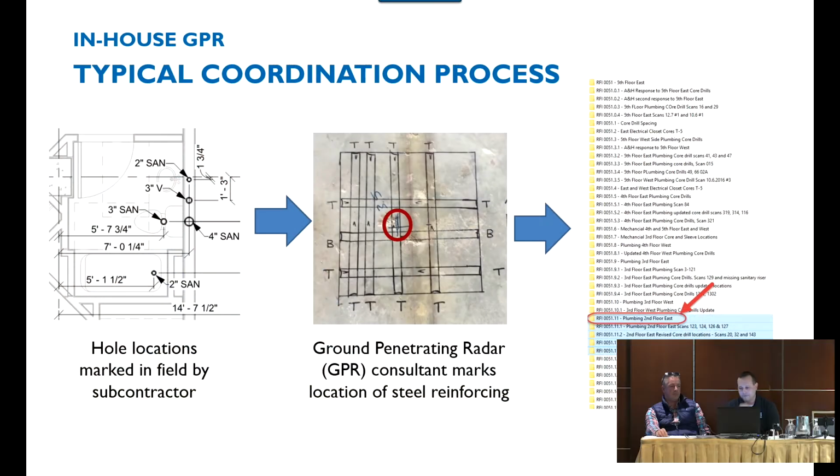And then ultimately, what ends up happening on our end, or what was happening before, and this is one of our actual past projects. We would then get a report from that subcontractor, so there's a little bit more time. The GPR consultant needs to put a report together, gives it to the plumber. They look at it, they send it to us. You're talking weeks, sometimes a month before you get these reports.